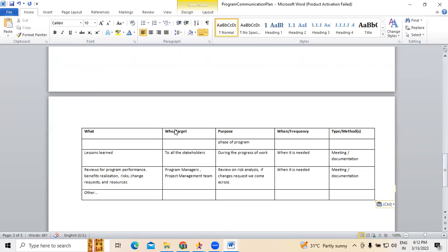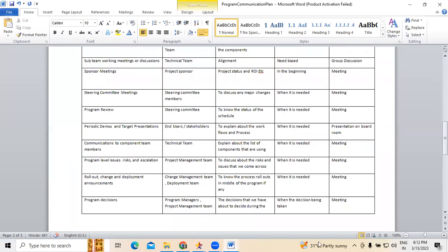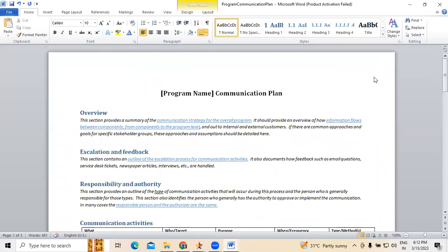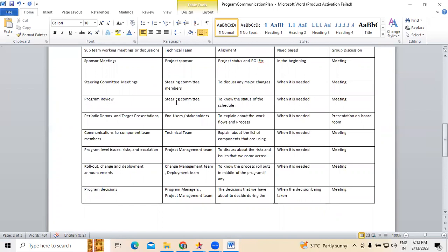That's how we do it. I'm just saying because once this document is created, it's signed and countersigned by everyone. So in a real case scenario, once the document is signed, let's say we need another communication or meeting during the program. How do we add that into this document? In the document you have to add a document revision history on top of it. If there is any kind of change, you can update and make the necessary changes here accordingly. Clear? Right.